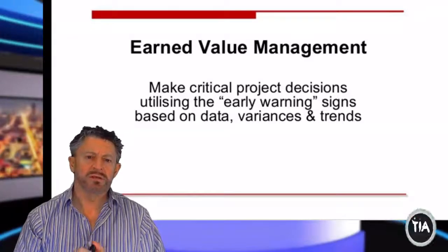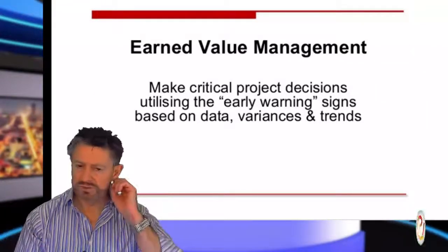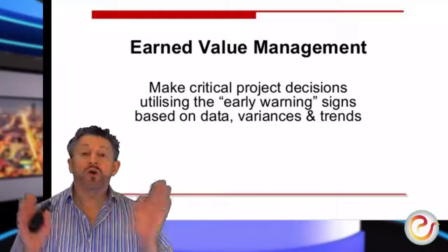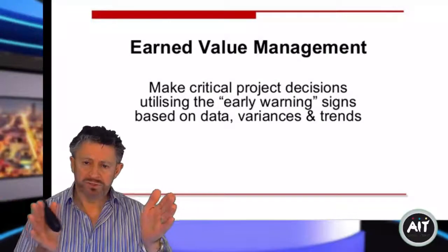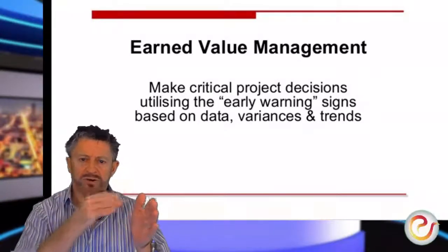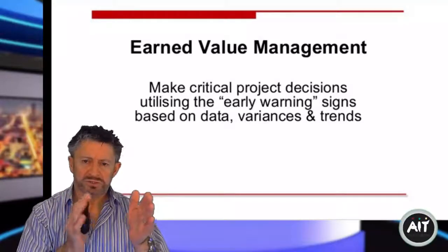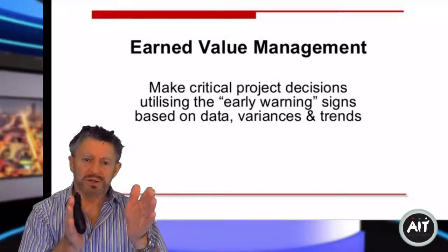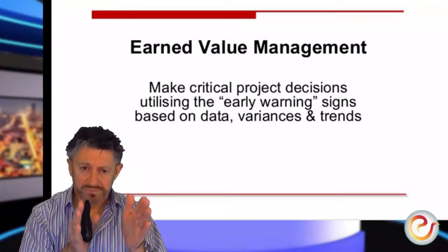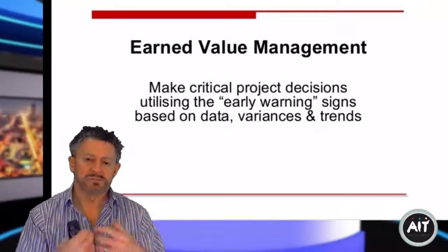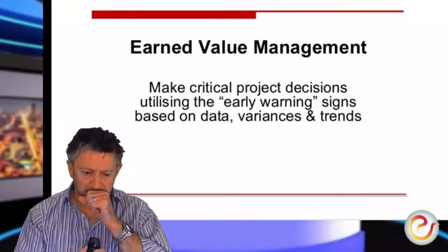Now the critical path in any project, as I say, determines the overall duration of the project. And if you can crash the project, which is the terminology used, by reducing the critical path, then all the other activities that are not on the critical path can also be reduced, and therefore you can come in ahead of schedule, or you can reduce the overall time to deliver the project. That's the whole point of project management.